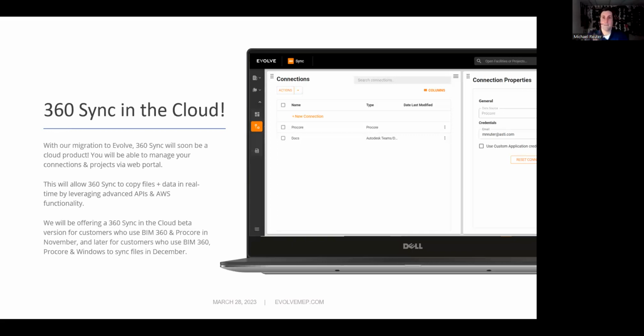And then that RFI, the architect or the engineer, they review it, they write a response, they add some markups to the files that were provided, they save that, and they mark it as responded or answered.